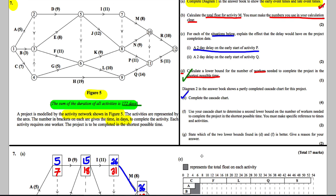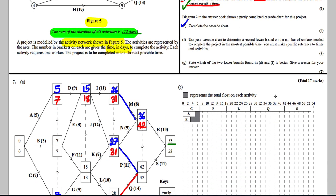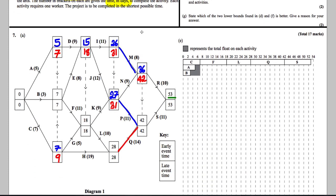For part E, we fill in the cascade chart. Activities C, F, L, Q, S, A, and B are already done. For D: it can start at 5 and is 9 long going up to 14, but could go up to 18. So we draw the box from 5 to 14 with slack extending to 18. For E: it starts at 7 and is 8 long going to 15, but could go up to 18. We shade in the slack and label it E.